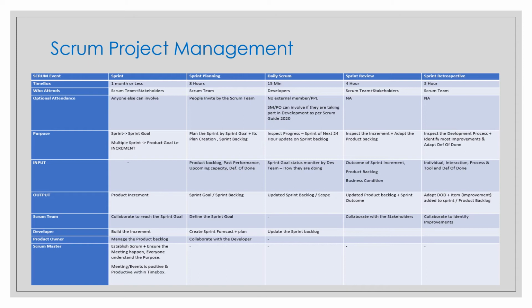So the sprint review is an informal meeting, not a formal status meeting, because if you get the outcome of a sprint, you don't need to wait for the sprint review. You can even inform the stakeholders of your outcome before that. This informal meeting happens to demonstrate the increment that is done, in order to obtain feedback and encourage collaboration on what needs to be done next.